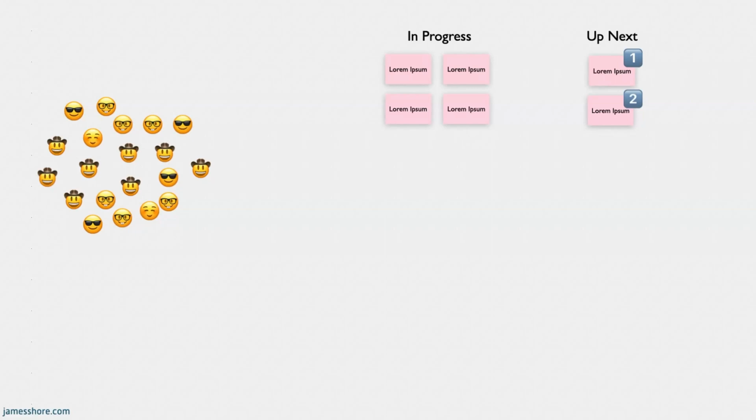Next, team members volunteer to lead, steward a team. Anybody can steward a team, but most teams are stewarded by engineers. The maximum number of stewards is limited to ensure that we don't have lots of one-person teams. We want to aim for about 3 to 5 people per team.